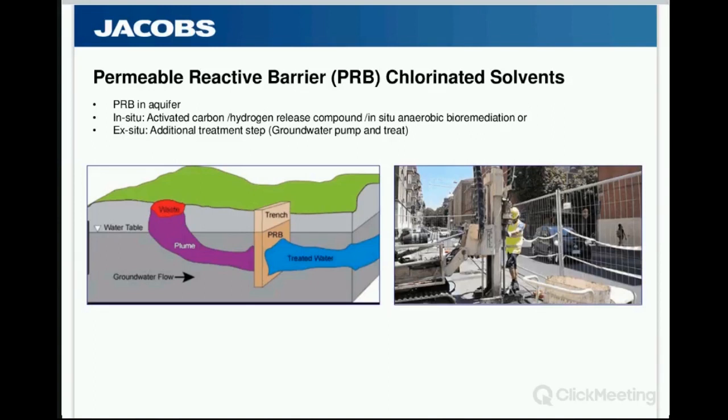which I think puts into context what I was saying about the cost of these trials. They're not cheap, but we're also quite nervous about the hydrological conditions. It's a very, very fast moving shallow water table, and it's pretty likely therefore that we're going to go for an ex situ treatment step at the place where the groundwater is abstracted, because of the uncertainty over the perma-reactive barrier's longevity for the lifespan of how long this water needs to be extracted for.